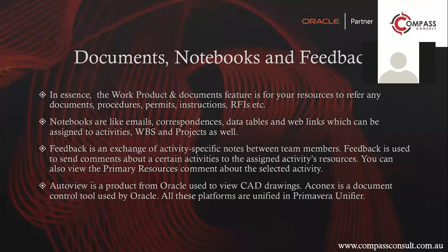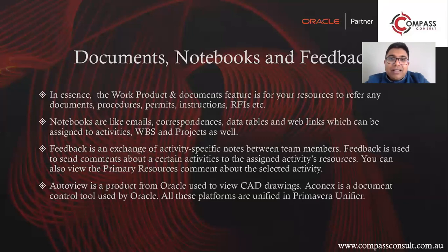And when he shifted it to May, that issue was covered up. Am I correct or wrong? Yes, you are 100% right, Azam. What happens is these calendars have non-working periods, and the calendar is very, very basic. It's not considering a period which is a non-working period, and it goes to the next working period that is available to it. And as lame as it sounds, it does wonders in real life scenarios. So that's right. That's a good observation.